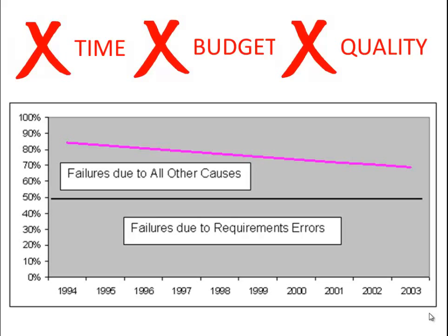Nevertheless, we would assume that somehow we would have figured out how to improve our success rates in the past 50 years. If you look at the failure rate from 1994 to 2003, we appear to be improving. But it doesn't seem like we have gotten past the 30% success rate, and 70% of projects still appear to be in trouble.